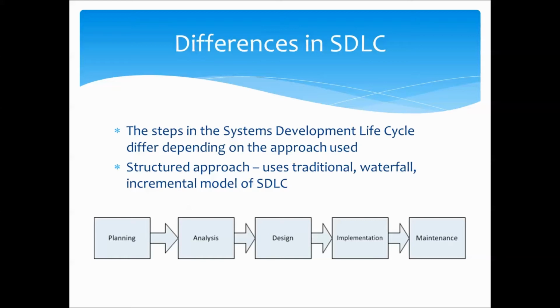The data and logic are then evolved from these process models. So the system is developed as a whole, so to speak. It is seen as a singular project with progress measured as a percentage of the whole project completed. And although there are exceptions, development generally only moves forward in the life cycle and never backwards.